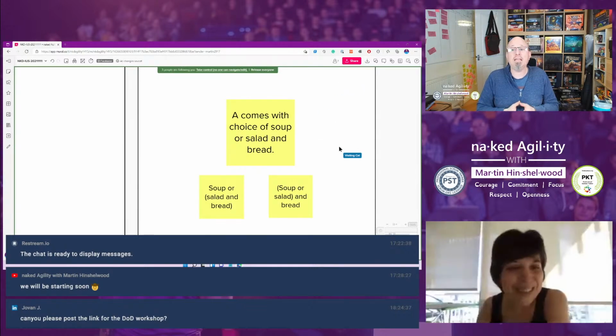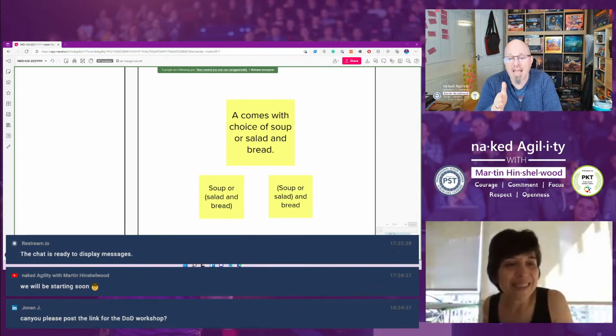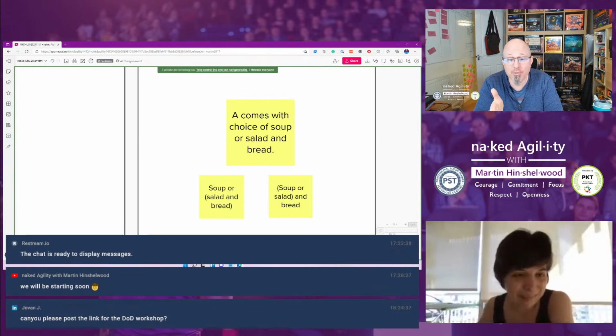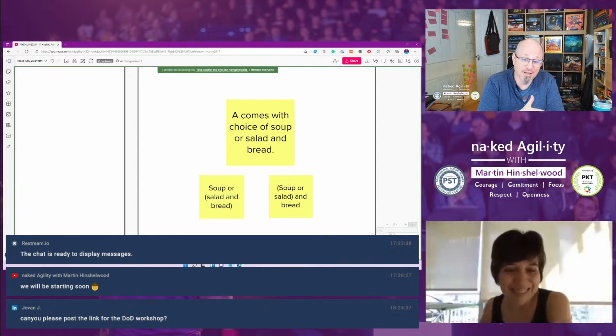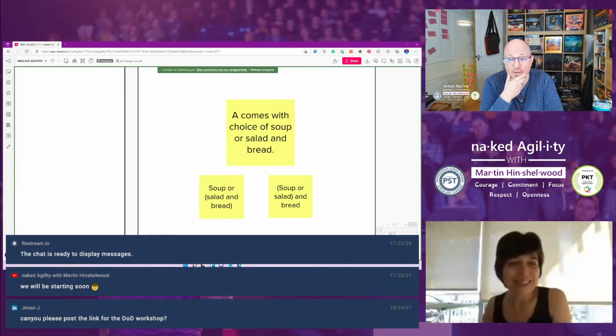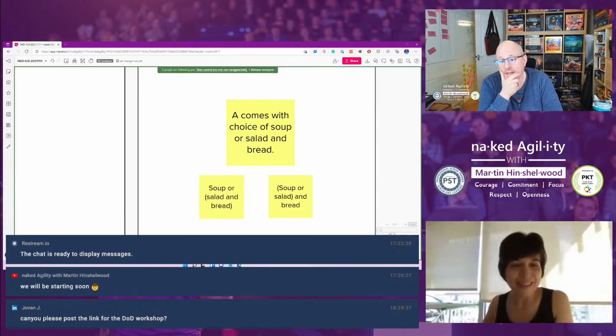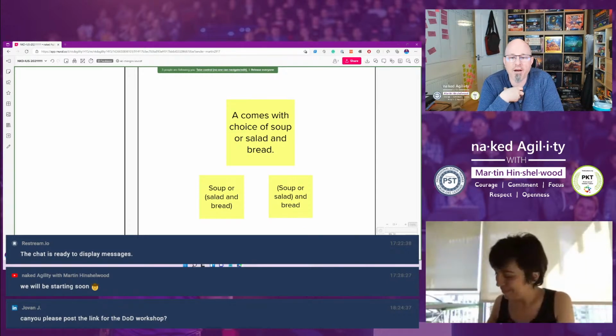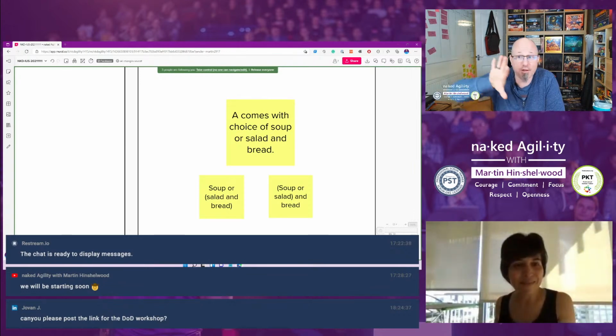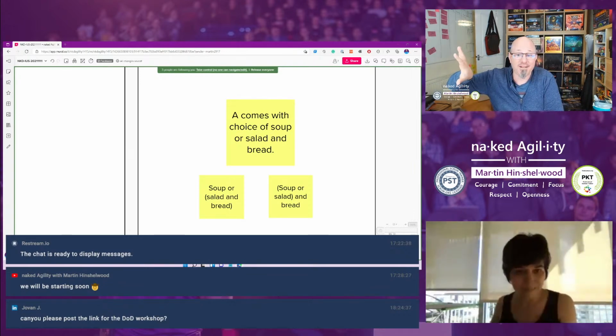Yeah, well, that's definitely one of those things that the business very rarely asks about until they get it and performance sucks. And by that time, it can often be too late to fix some of the performance issues because they're endemic to the way the product's been architected, and it's a big deal to change it. Yeah, absolutely. And that for me is where conversations around definition of done come in, right?